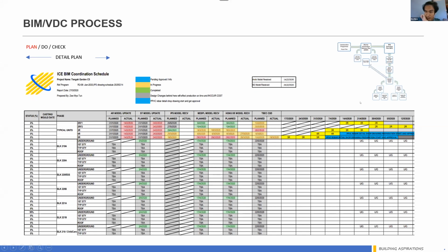I mean, in this meeting, for example, we are tracking what we are working on here, right? I will keep putting in information. At the moment, the C36 project is a very fast project, so we don't have a lot of information, but we can say we keep tracking. So in the future, we can refer back to those tracking lists and come out with roughly how long this takes. We will put it in the planning team's planning info, so more accurate information can be done. Yeah, very good.